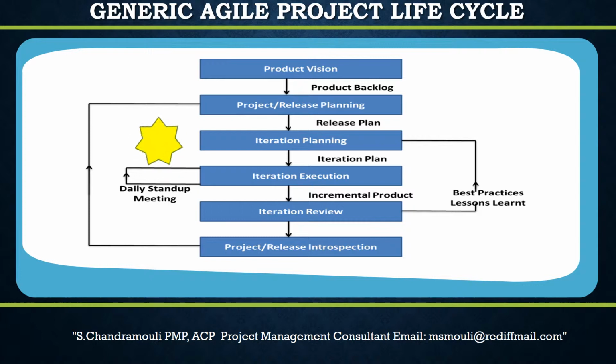Release planning happens in repeated cycles, creating a release plan which determines the number of iterations inside each release. Release period, timeline, depends on various factors like competitor pressure, contract, predetermined schedule, financial deadline, etc. Release is actually a set of iterative cycles. Sometimes different iterative cycles will be executed by different teams. This is particularly applicable when multiple teams are involved.